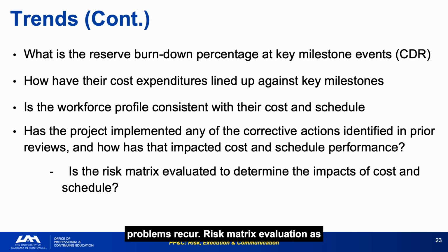Risk matrix evaluation as a cost and schedule diagnostic. Specifically, whether the risk matrix has been used to assess cost and schedule implications is the integration check that connects risk management to financial management. At every program review, include a standing agenda item on the status of prior corrective actions. The answer to that question tells you more about program management culture than any metric on a dashboard.